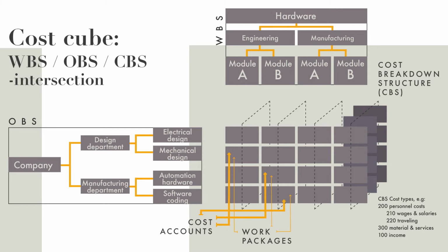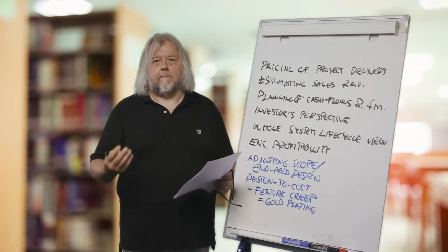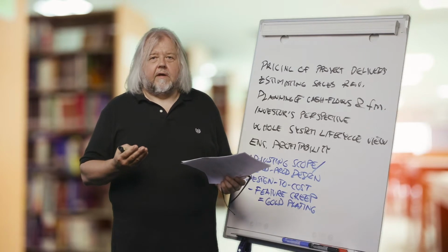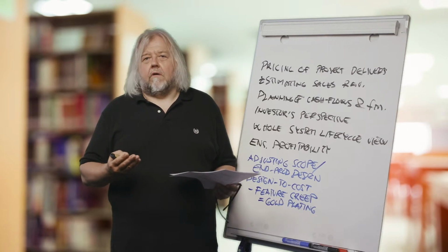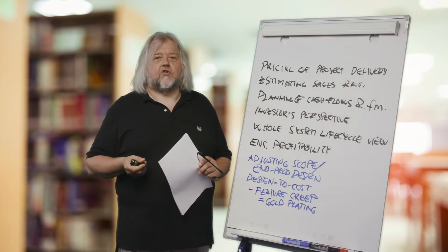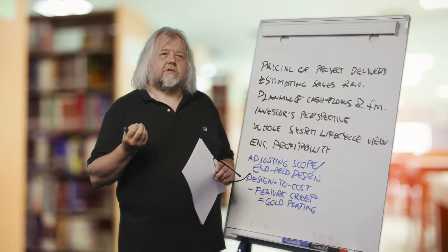So this is also a company level structure. And the only structure here which is project-specific is WBS, work breakdown structure. And it's then connected to companies' other systems and accounting, and we can detail our, for example, cost estimates and budgets and actual costs by recording them into these structures.